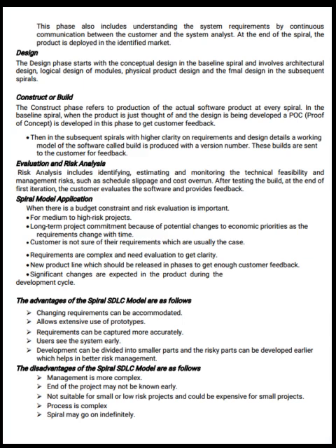Now let us see evaluation and risk analysis. Risk analysis includes identifying, estimating and monitoring the technical feasibility and management risks such as schedule slippage and cost overrun. After testing the build at the end of the first iteration, the customer evaluates the software and provides feedback.